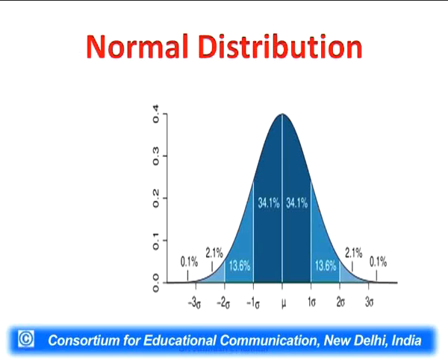Each activity's timings follow beta distribution. We shall be using beta distribution. If we calculate the timings of a particular path, like the critical path, which comprises a number of activities, that particular time will follow normal distribution.